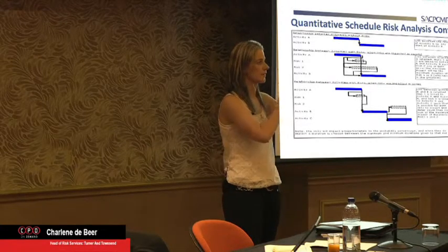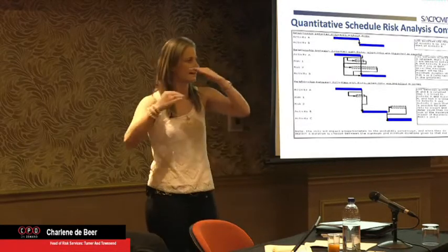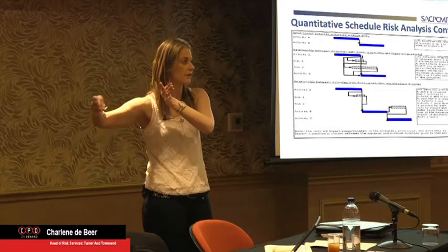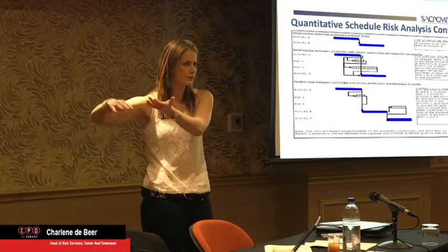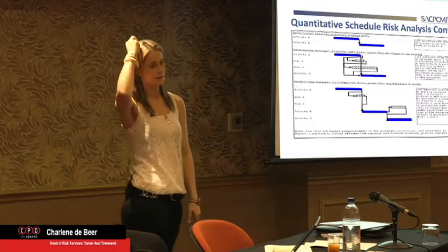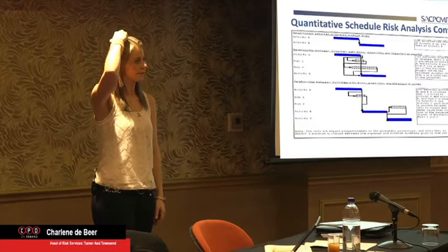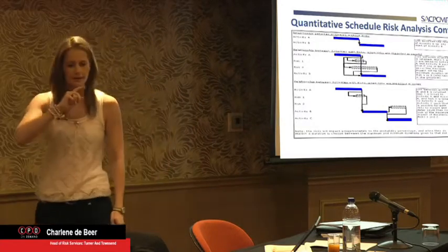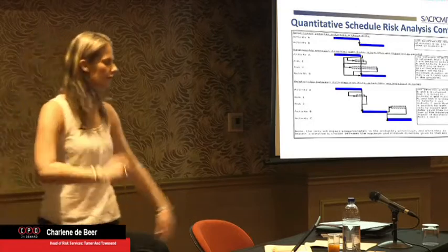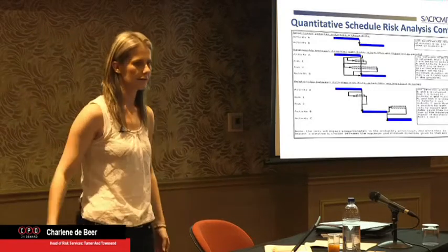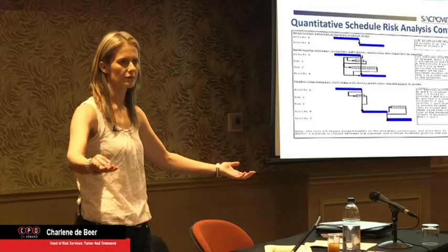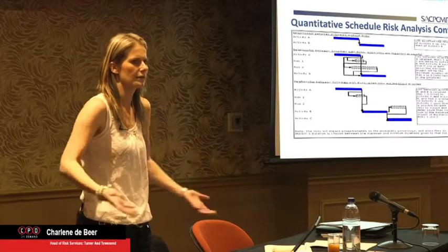But if we do the specific costs in the specific areas, and those are exactly the same areas being impacted and having a knock-on on some other trades, and we cost those trades, that costing is actually quite accurate, if that makes sense. So it has to be like for like. You can't link 10 of these risks and cost 10 other risks and then say you're going to overrun 6 months, you need this much money. It doesn't make sense.